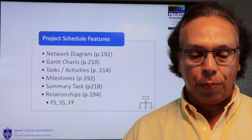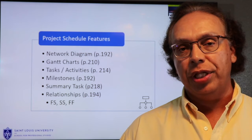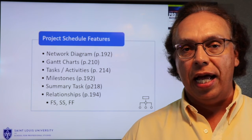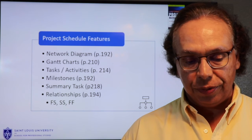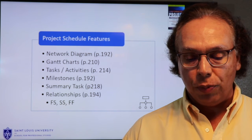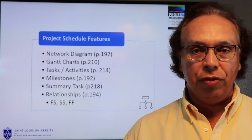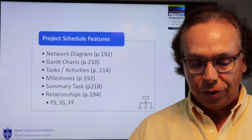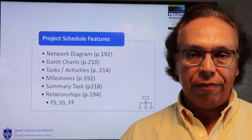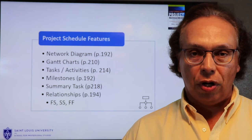In this chapter, there are several project schedule features to point out. Network diagrams on page 192 help you understand relationships such as predecessors and successors. Gantt charts on page 210 are visual depictions of schedule and time, which are great tools for leadership reviews. Tasks and activities as diagrammed on page 214 are good to show your team and get them on board with the detailed schedule. Milestones on page 192 are those significant events to include in your schedule. Summary tasks on page 218 show roll-ups of child tasks, illustrating the parent-child relationship. Page 194 describes the three primary relationships: finish-to-start, start-to-start, and finish-to-finish.